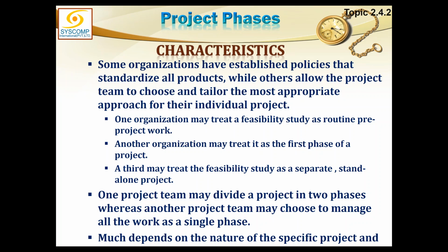So the most important thing is the review. Phase end review is most important. Exactly. Because you have told your boss that this is the point I will deliver you this thing. You can come and check. And that is your decision point whether you want me to continue or stop. So I am physically giving him this opportunity that he can close the project at this point if he wants. And he can be happy and he can tell me to go ahead, move to the next phase.